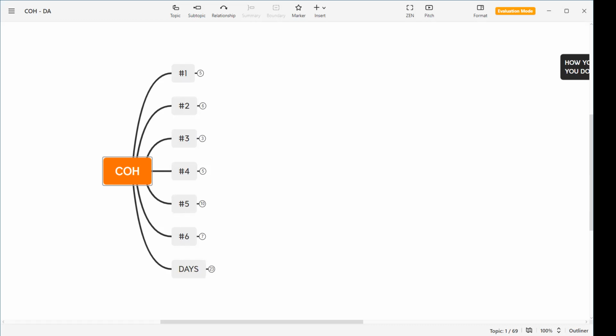So when this happens, you will ask the customer, is it okay if I understand that you, as a bank, want to get launched with all these 5 things? In 1 day or 2 days or 15 days, we cannot deliver everything, but we can help you get started with your business. What if I give you the privilege to add new customers and open their new accounts? Can you start from there? Because not everyone will get started with fund transfer.